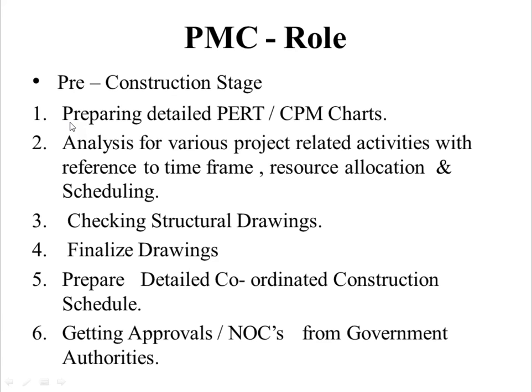They need to prepare detailed PERT or CPM charts, that is schedules, analysis for various project related activities with reference to time frame, resource allocation and scheduling. They need to check the structural drawings and finalize drawings. Also, prepare a detailed coordinated construction schedule, and they need to get approvals or NOCs, that is no objection certificates, from government authorities. So these are the roles of a PMC.